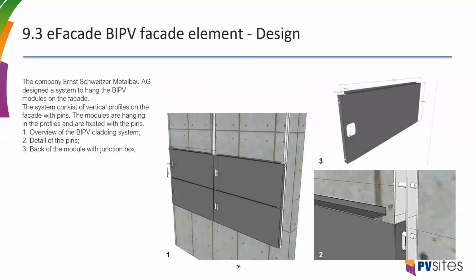These buildings had a red brick, and that was actually one of the problems we have in the beginning, because it was very difficult to get permission for the cladding with black facade elements, because the image of the school from red to black is a completely different view, of course, completely changed. But okay, finally after several discussions with the local authorities, it was accepted, and the permit was given. And then it was in the middle of the holidays, and it was not possible to start the work, and then we had examinations. So at the end we had some delay with the installation of this project.